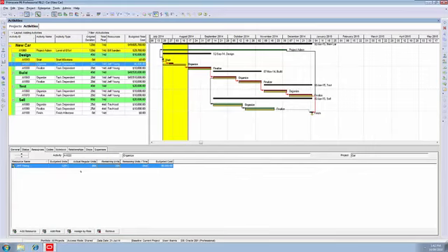So resource hours, it's put in information based on what we put in the status tab. So it's assuming that there's 30 hours still remaining and anticipating that 90 have been done. It's on a 6-hour day, so there's a little problem there that we'll have to sort out later on. But at 6 hours a day, that is correct. So we don't need to make any changes there. Expenses, there are no expenses on this one. So that's it for this one.